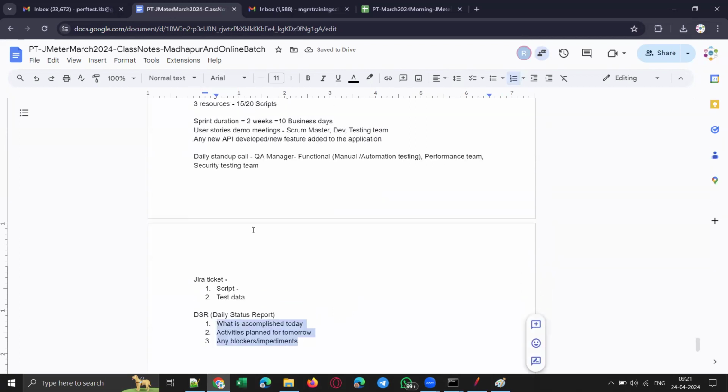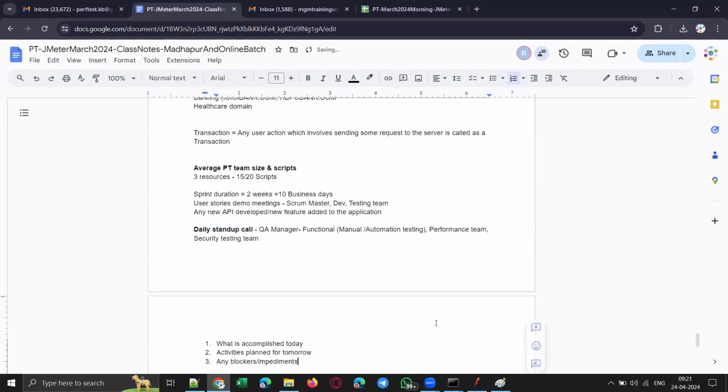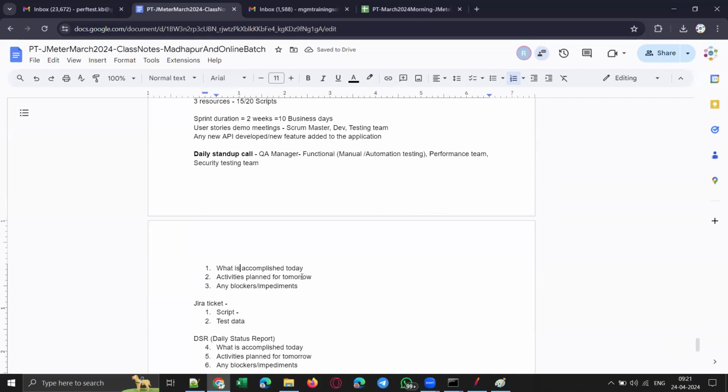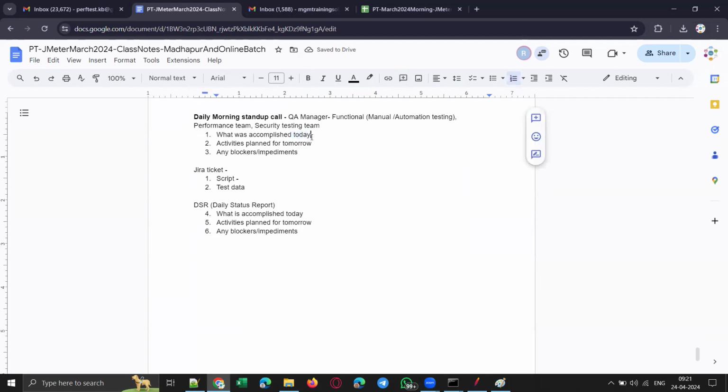And by the way, when I told you that daily we will have a daily stand-up call, right? This also will be the agenda for that meeting. See, this is in the daily morning stand-up call. If you are having a daily morning stand-up call, these would be the agenda items. What was accomplished yesterday? Activities planned for today. And any blockers or impediments. So this would be the agenda in the daily morning stand-up call.